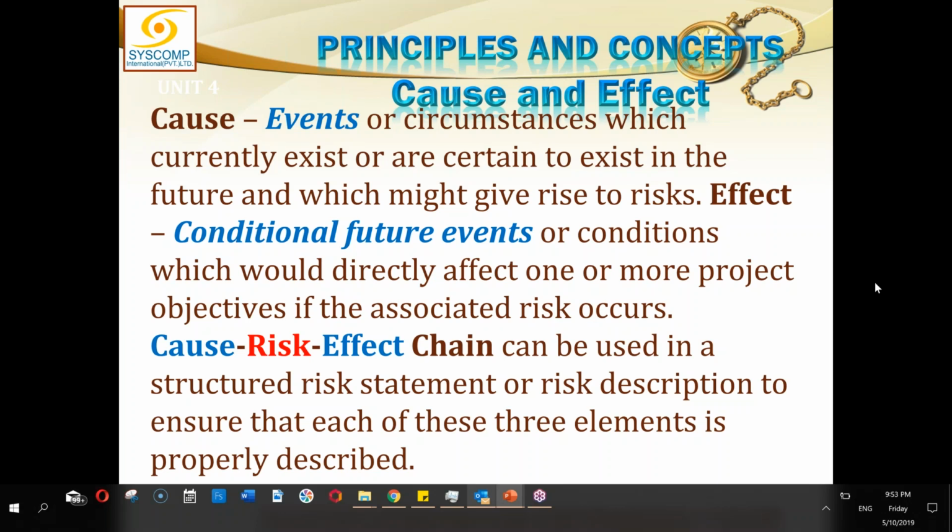Sir, this format resembles the situation we are in. I would say because there would be a lack of availability of manpower and supply materials during the month of Ramzan, the schedule of the project might overrun or stretch, will overrun its due date, and then the impact is that the cost may increase.